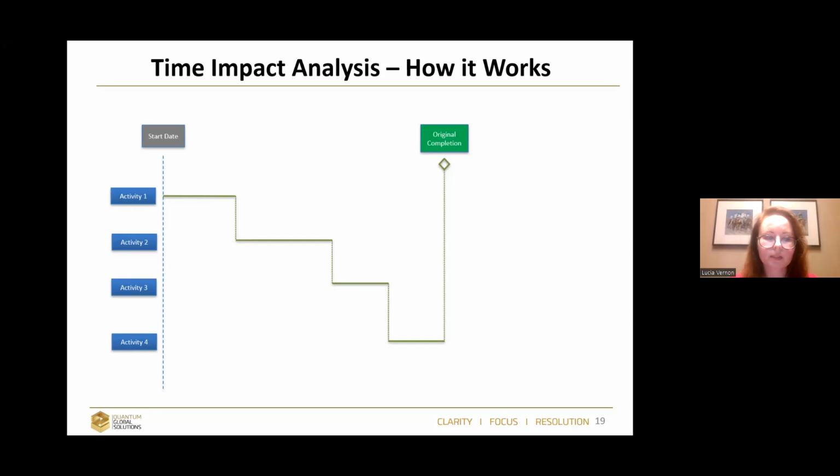Sometimes the updates are constrained. Sometimes they will show you the same completion date, so there is no movement. And what actually is happening is the planners are maybe shortcutting, changing the links and logic to make sure the completion date is static and it's all showing without a delay. This makes it really difficult to prepare the proper delay analysis, because then a reconstruction will be necessary to actually see what happened and how the delay even pushed the completion date.